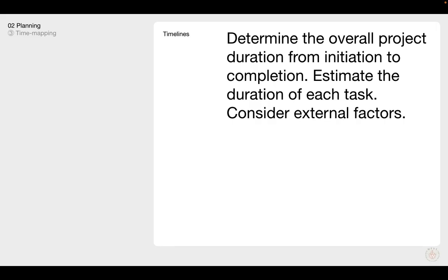So holidays or festivals. And what could also help you estimate is using any sort of historical data from similar projects to inform some of the estimates that you're allocating to each of these tasks or phases of the project. And I feel like you can definitely ask any of the resources who are also assigned to or will be doing some of the tasks how much time they would take to actually complete the task if you feel like you're having trouble estimating.